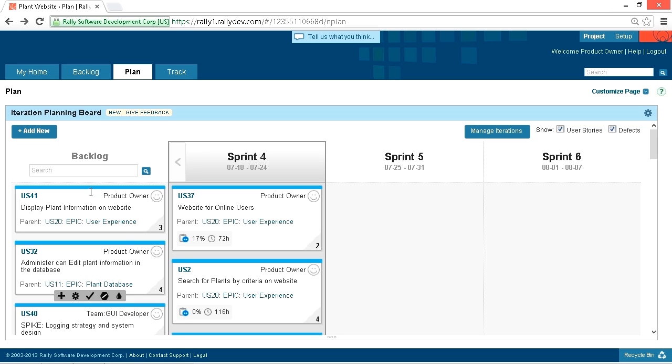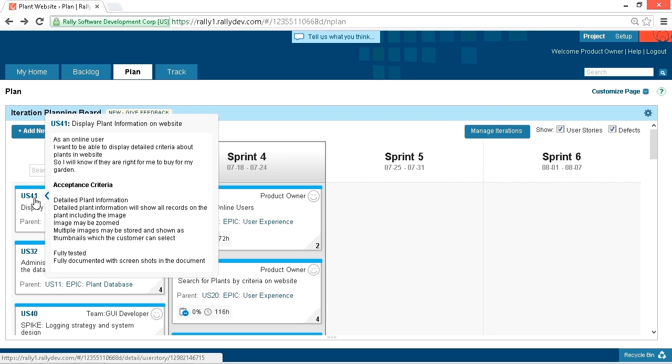When given a well-groomed product backlog, the first part of the sprint backlog meeting is spent with the product owner answering any final questions the Scrum team has about the highest priority items in the product backlog. The Scrum team needs to understand each story's acceptance criteria, so they'll know when the work they do to implement the story will be done.